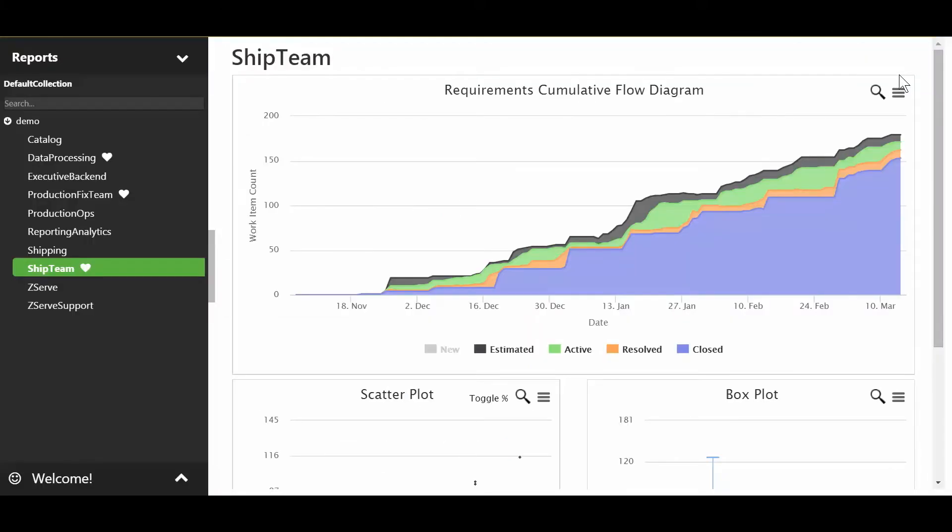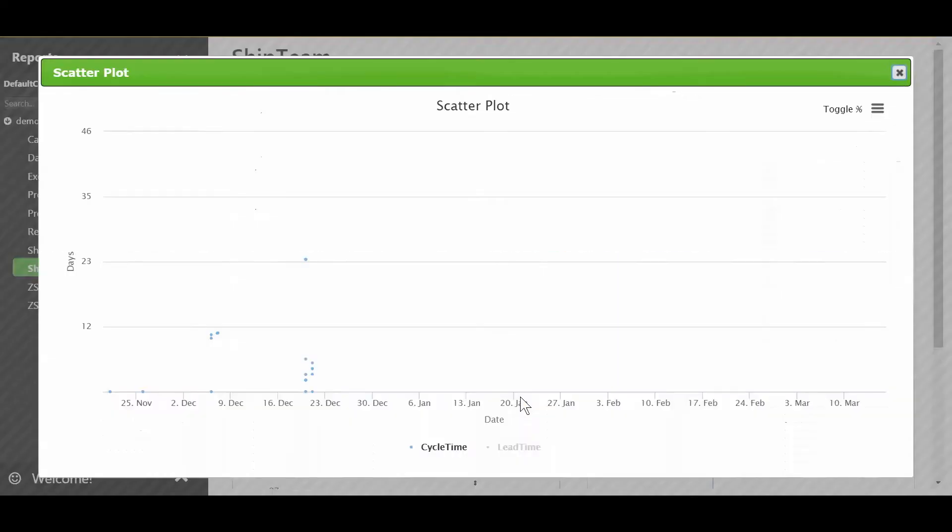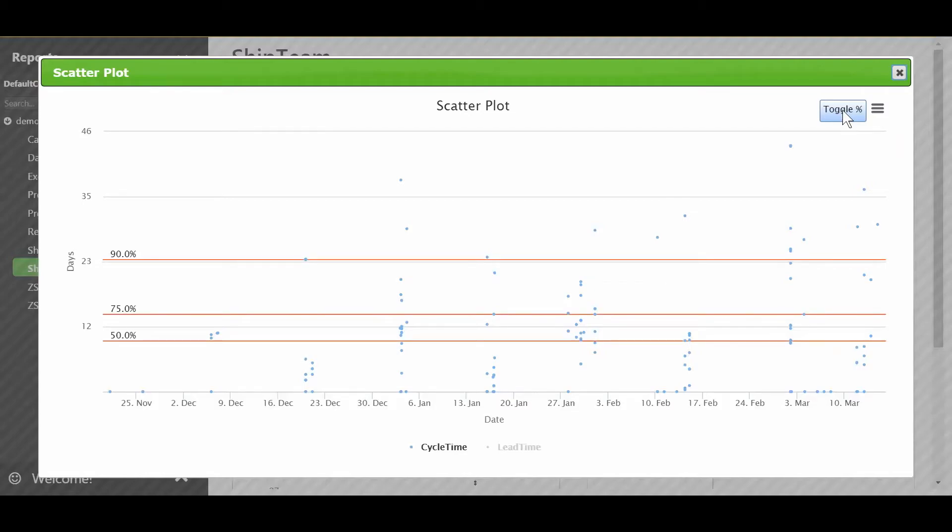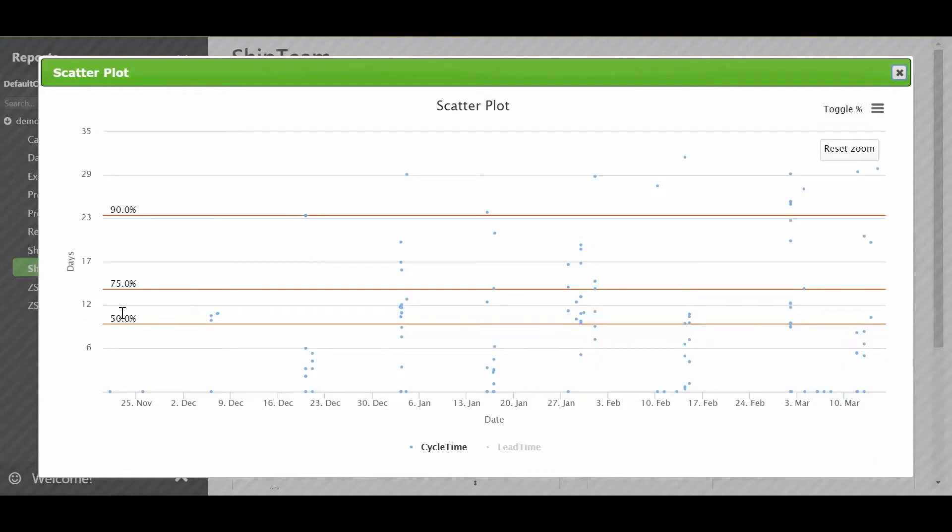I'm going to go out and look at one more thing. And a lot of scrum teams don't measure one of the key indicators of how well they're delivering. And that's looking at their cycle time. Now again, cycle time is after they've committed to it. They've pulled it into a sprint. And we can see, I'm going to zoom in just a little bit more here. As we zoom into this, we can see that at about day 10, 10 days or less, they complete 50% of their work.